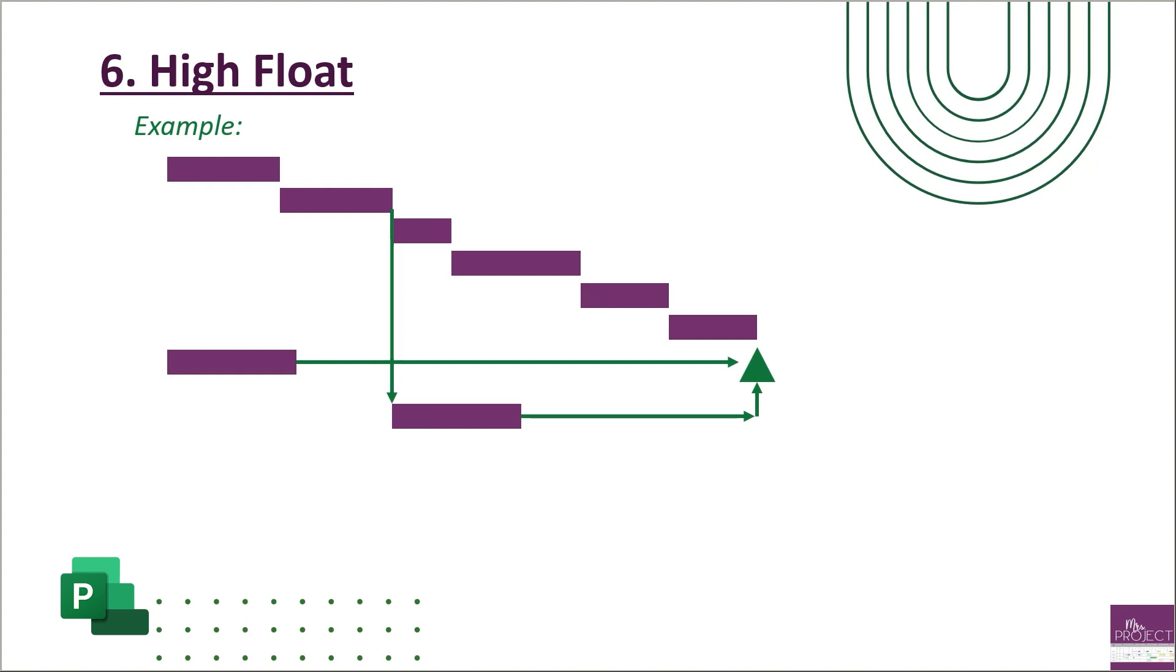And same with the second one. All it was needed for is like, yeah, you started it after three but then it's linked to the project end. Are you sure there's nothing else it needs to be linked to that's critical, that no other task needs it? It's just floating there all by itself. This makes you think through it because it's saying yes, there's a big large quantity of float, and are you sure it's linked to the right task? That's why you have the margin.